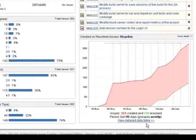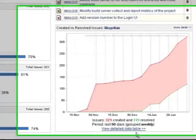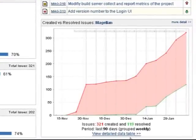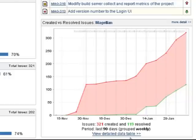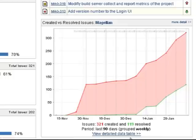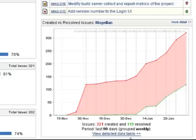Within JIRA you can actually set up particular charts, you can set up pie charts and line charts and graphs and this nature, but what you're seeing here is actually a burn-up chart of created versus resolved issues. So what my bug tracking system is automatically doing for me is creating a burn-up chart saying, hey, you have this particular velocity of issues or user stories being created and here's your catch-up velocity of showing you actually where you are in attempting to catch that trend line going forth.